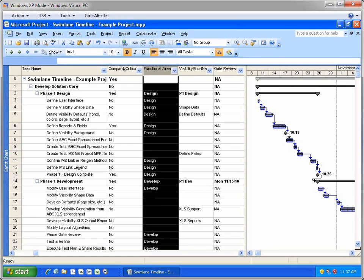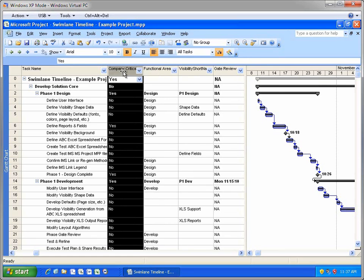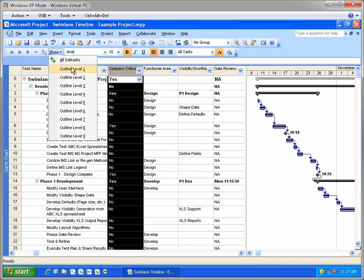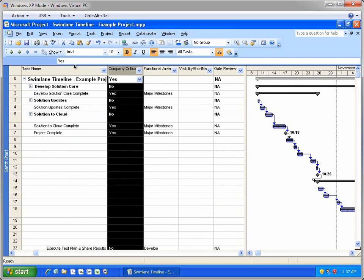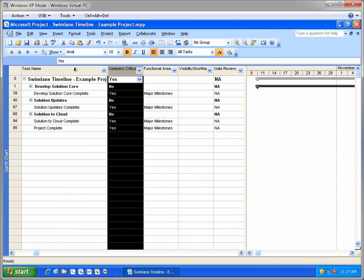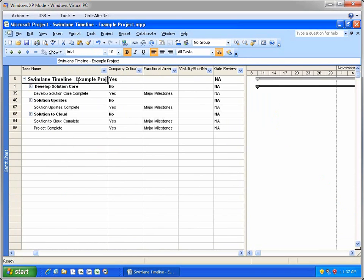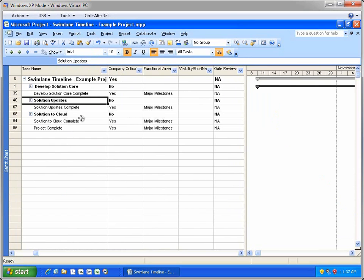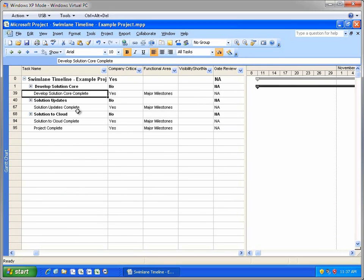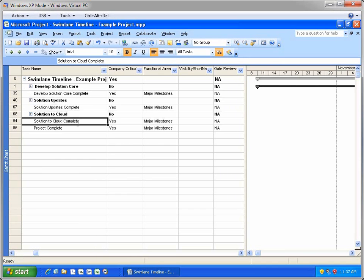The other thing I want to show you in this project is the Top Outline Level view. Let me switch from showing all subtasks to just showing Outline Level 1. The Project Row 0 name becomes the Swimlane Timeline title. The Summary Tasks become the Swimlanes, and the Milestones, that are at the same outline level as the Summary Tasks, are placed in a special Swimlane called the High Level Milestone Swimlane.